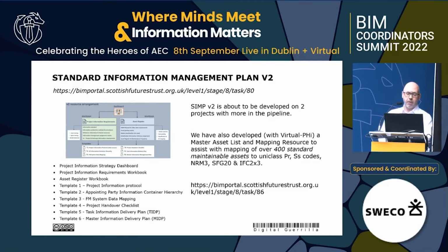And as Ryan had pointed out, the SIMP has been upgraded to version 2, which got released a few months ago. So we're currently developing that in 2 projects. Ryan had also mentioned one of the biggest benefits of SIMP version 2 is the asset register. I showed you had to run through the full NRM3 list, whereas now we've got a condensed 411 maintainable assets. So it's actually a more definitive set the client can start to work from straight away. So it's using that as a basis.